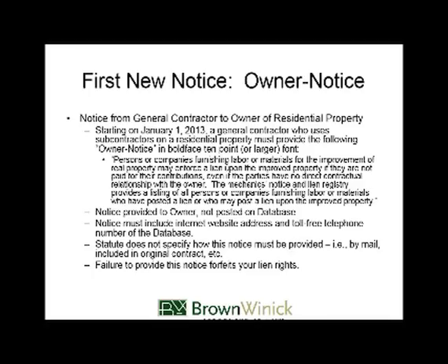So let's talk about these new notices that were created and are now required by the new rules. The first new notice is something called an owner notice. And this is a notice, again, required only on residential properties, given to the owner.